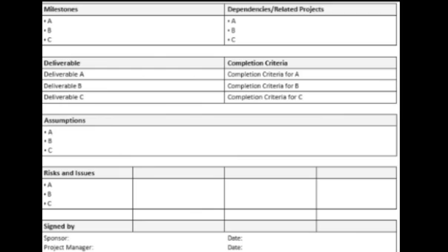Another thing you could be assuming is fair weather. You are assuming that in the course of carrying out each of these milestones or deliverables, the weather will be fair. Now let's assume this project you are embarking on fell in the rainy season, and there was a heavy downpour of like 2-3 days out of the 7 days that you have given as your milestone. It means you are also already running short of time.